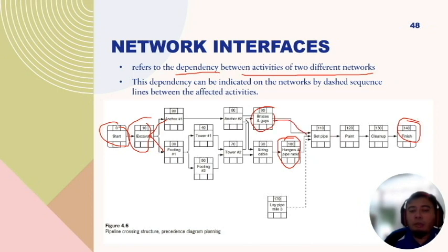So you want to set pipe. In order to set pipe, you also need to lay pipe. This is from another network of activity. If it is from a different network, the line should be a dash line like this.